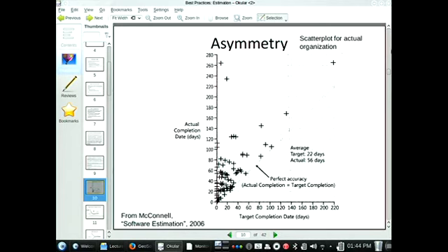It's late because of scope creep. You're working on things, and because it's late, guess what happens? They give you more requests. They say, "Oh, come on, you're dragging this out. You folks have been working on this forever. Well, guess what? Our business has changed, or we need this extra thing. I mean, you still haven't delivered this project. Come on, you can do this one more thing." That happens a lot. And again, I've seen companies fail because of it. I've seen companies fail because of incorrect estimates.